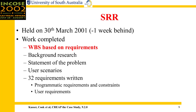By the time we got to the SRR, we were one week behind schedule. The work that was completed was significant. We had come up with a work breakdown structure based on requirements, so all the work was based on activities that could be traced to implementing the requirements. The students had done some background research, developed a statement of the problem, come up with user scenarios for how CREEP would be used, and 32 requirements had been written, covering programmatic requirements and constraints as well as user requirements.